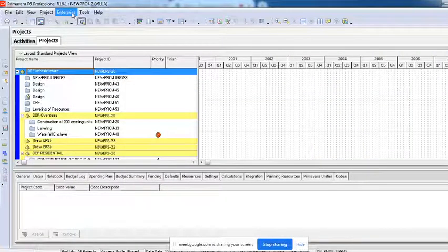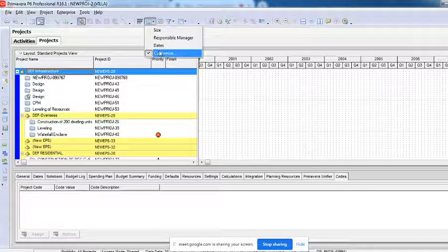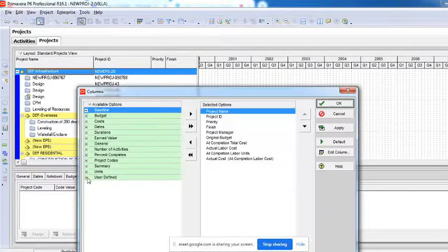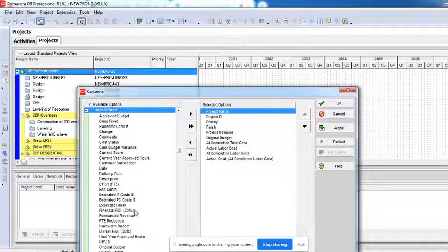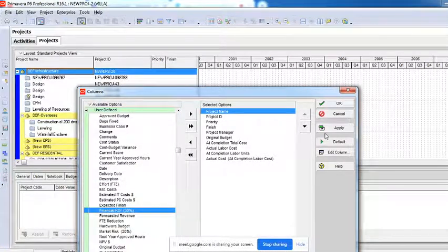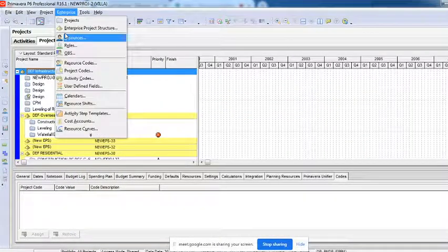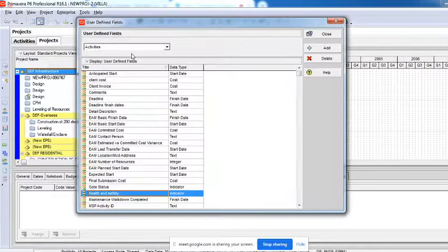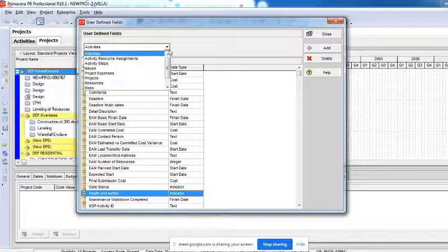So if you have created a user defined field for the projects page, then you will have to come and search it here, customize user defined fields, find it here, and then bring it to the other side. Understand? You need to be very careful about where you are creating it. By default, people feel a user defined field is just a user defined field and create everything here. That will not work. You will have to select the particular page you want to do it for.